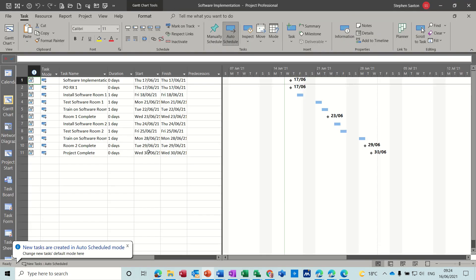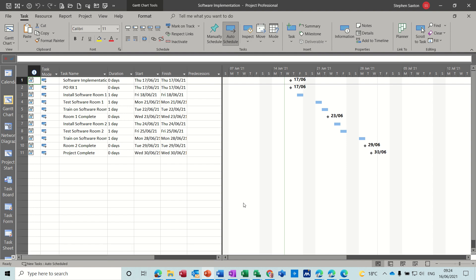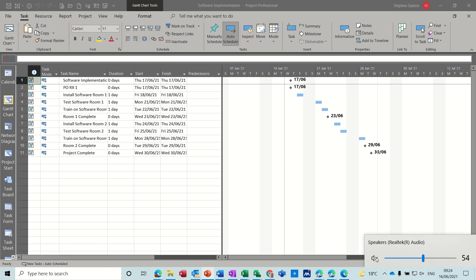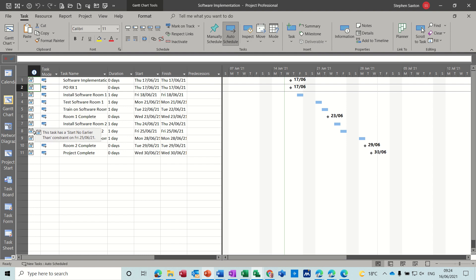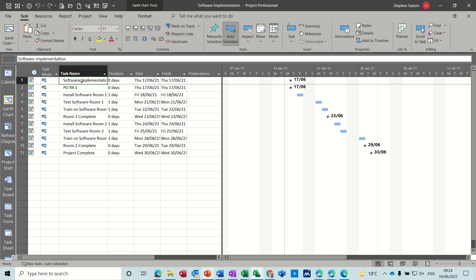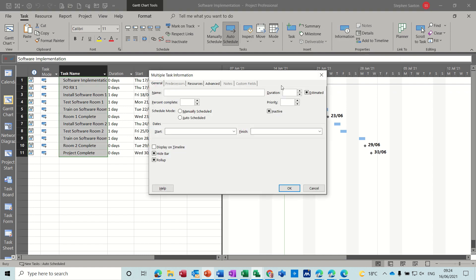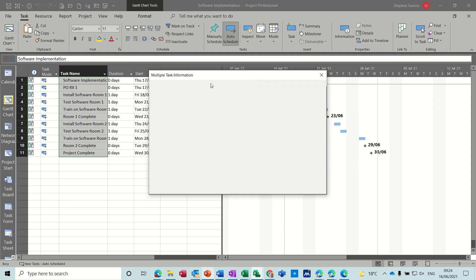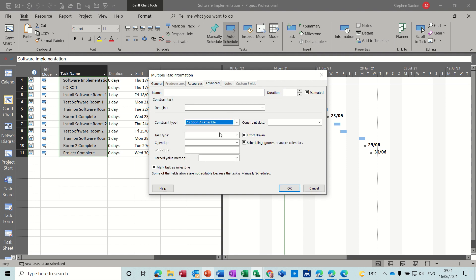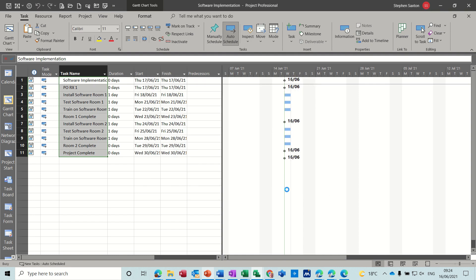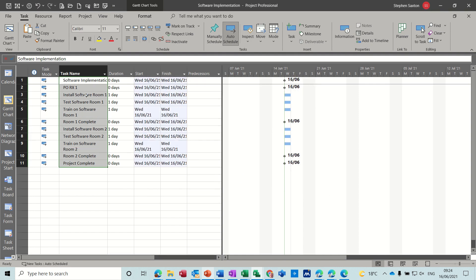And then it drops that into Project and then you have to do a little bit of editing in Project. So basically what you've got is indications in this column that these tasks are start no earlier than or finish no earlier than. So I don't want that. I'm just going to highlight all of these, go to the information option and just set that back to the default which is on the Advanced tab, constraint as soon as possible for this type of project. Click OK to that.